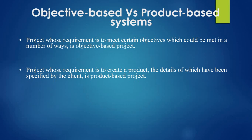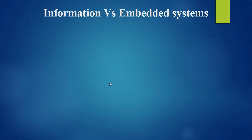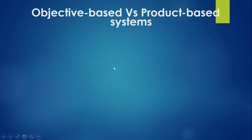The next stage is a project to actually create the software. This is useful where the technical work is being done by an external group and user needs are unclear at the outset. The external group can produce a preliminary design at a fixed fee. If the design is acceptable, the developers can then quote a price for a second implementation stage based on an agreed requirement. If they come to an agreement, that company will generate its outcome project.